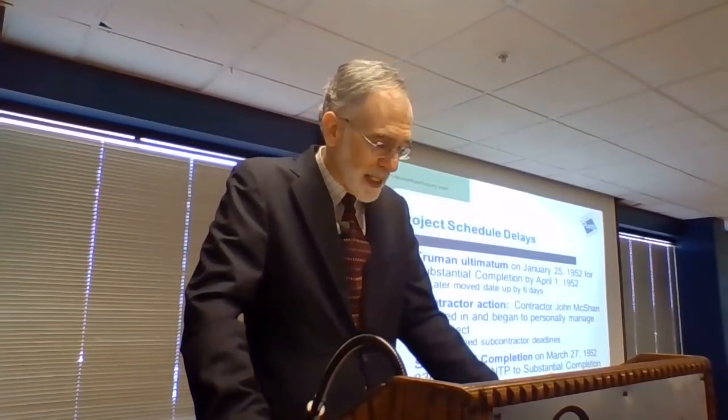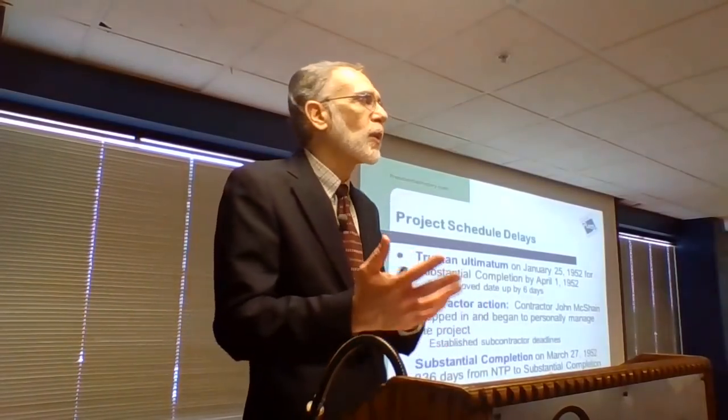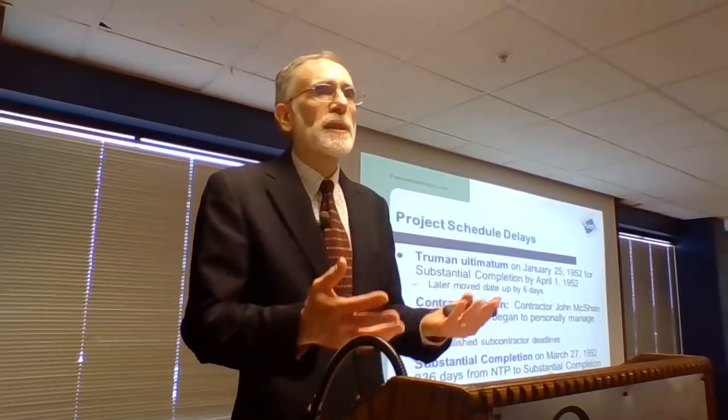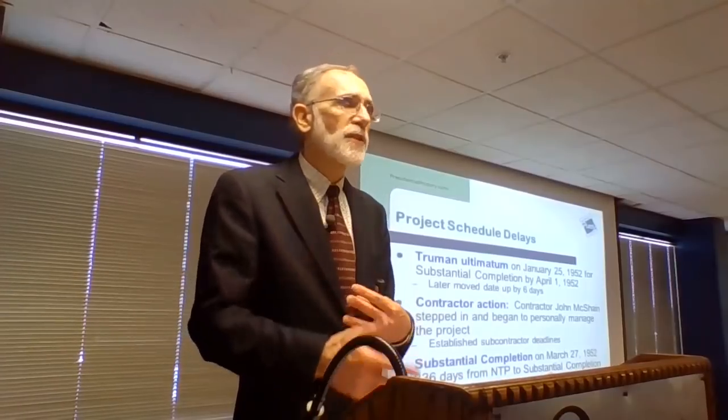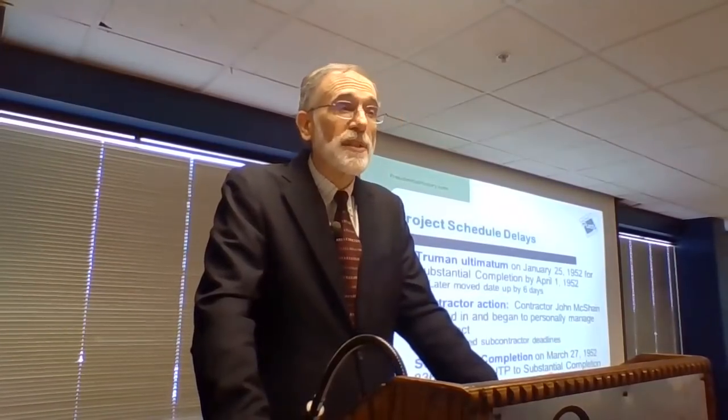It's a date that he ultimately moved up by 6 additional days. The contractor, John McShane himself, at this point stepped in, and he started managing the project. It makes you wonder what his project manager and superintendent were really doing, but McShane stepped in. He established schedules for subcontractor deadlines, and so the project was eventually substantially completed on March 27th, 1952, 76 days late.